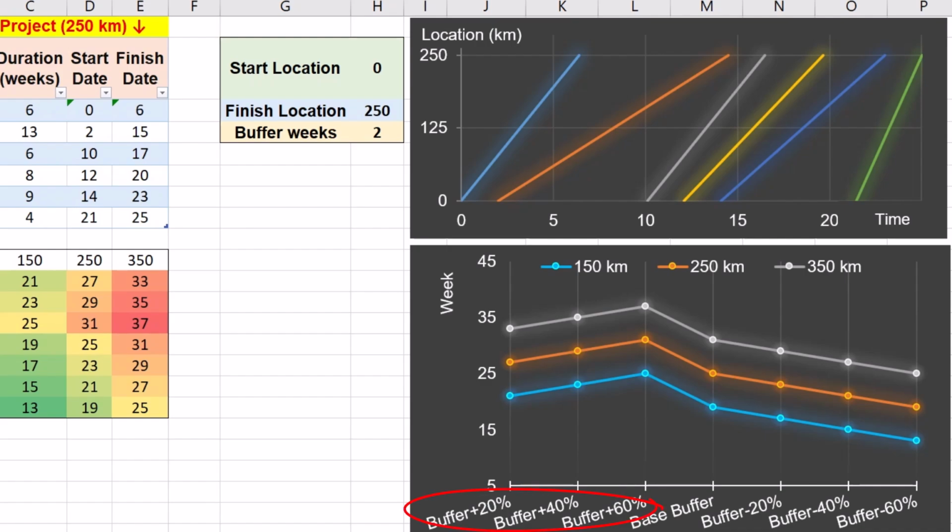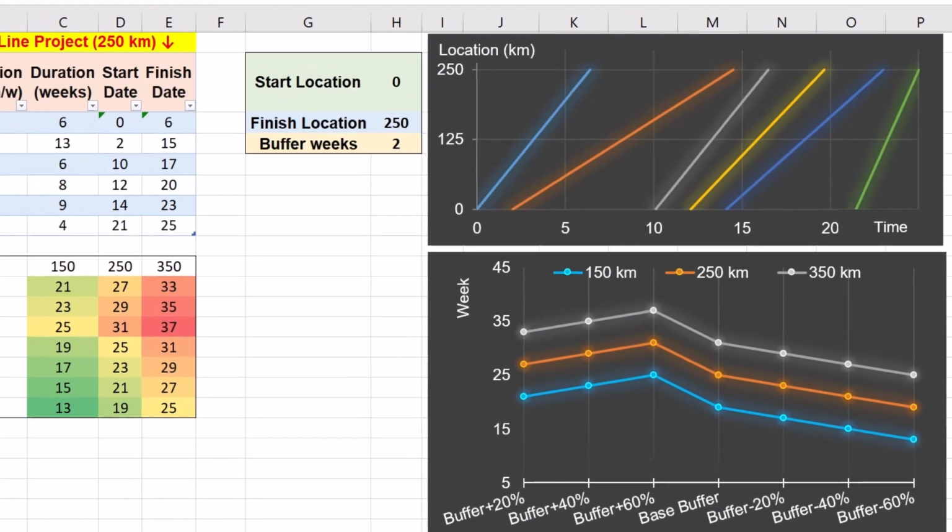Overestimating buffers may lead to inefficiencies and prolonged schedules, while underestimating them can increase risk of task overlap and disruptions. Similarly, longer projects tend to amplify the cumulative impact of buffers and show that optimization is essential for maintaining cost effectiveness and timely delivery. By aligning buffer sizes with realistic project durations and specific workflow conditions, project managers can better balance flexibility and efficiency in LBMS implementations. This ensures smoother task sequencing, delay minimization, and enhancement of overall project performance.